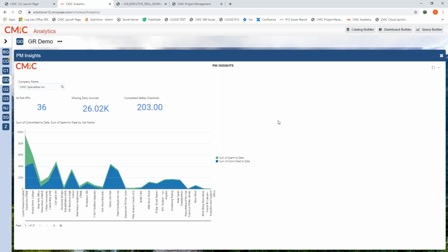And one of the examples that a customer gave us as a good indicator of that is what RFIs are on the project that have been flagged to have a potential cost impact, but have no linked potential change order. In some systems, you might call it a COR, change order request, or a PCO, potential change order. We call ours PCI, potential change item.